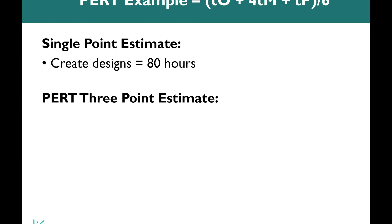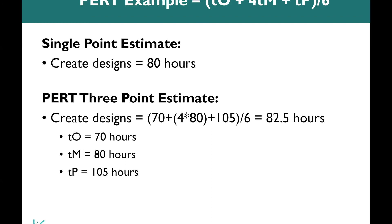PERT, however, using the formula that I just showed you, let's go ahead and calculate this out. So we take 70, our most optimistic. We add that to our most likely, which is again weighted by 4. 80 times 4 equals 320. And then we add on our most pessimistic or worst case scenario, which is 105 hours. Once we add those three numbers up, they equal 495. And then when we divide them by six, we get 82.5 hours.